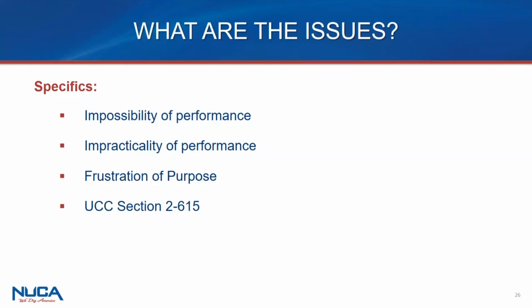And the contractor cannot have assumed the risk in any other way in his contract. So catch-all phrases saying, you're familiar with the site, you're familiar with this, you're familiar with that, and you're taking all the risk. Those are going to be bad phrases for you. You can't assume it, all right? You're going to have to show more than the costs have become greater than you originally anticipated.